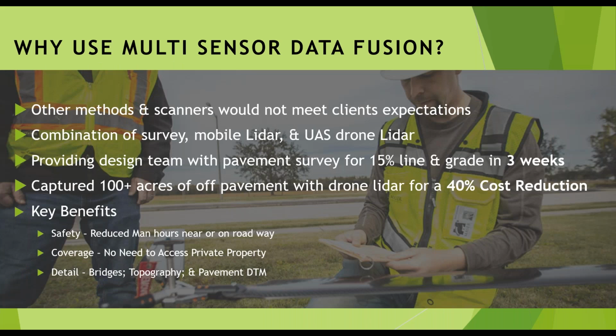So why use multi-sensor data fusion? Other methods and scanners were not going to meet the client's expectations. A combination of survey, mobile LIDAR, and UAS drone LIDAR is what was done. We needed to provide the design team with a pavement survey for 15% line and grade within 3 weeks. Again, anyone working in the survey area would know that doing a 38 lane mile highway area and 100 acres of offsite design grade survey in 3 weeks is very hard.